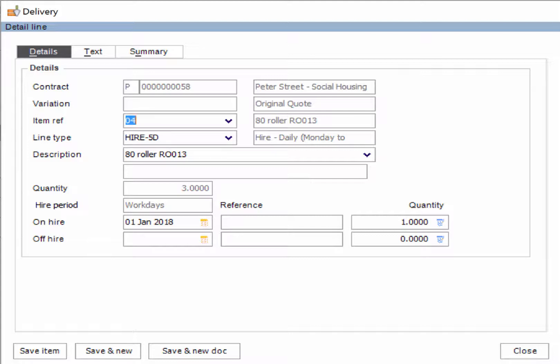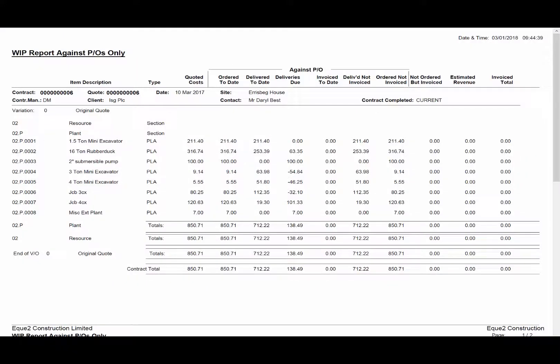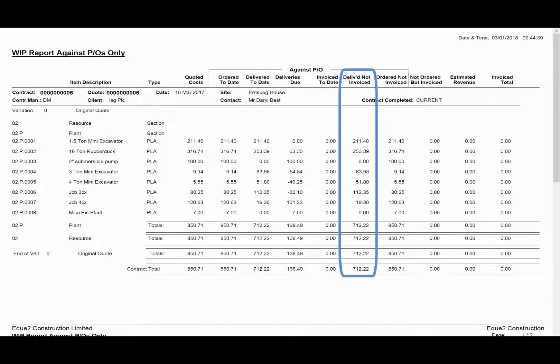This value will automatically increase as each working day passes. Using the cost rate and quantity, Construct can automatically generate cost accrual values which can be seen in the delivered not invoice column on this work in progress report.